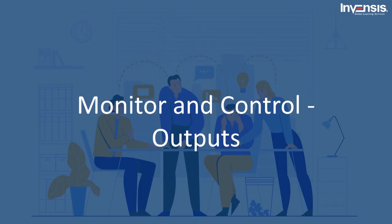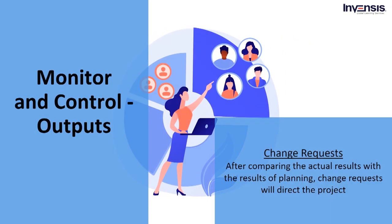In the next part of this session, we will talk about the outputs of the monitor and control process. The first output is change requests. After comparing the actual results with the planned results, the change request guides the project. You can instruct your project and product scope, quality requirements, schedules, and cost base to grow, adjust, or shrink. These changes pave the way for recording and documenting new requirements and can also affect project management plans, documents, or product performance. All changes that meet the project's change control criteria should go through the integrated change control process established for the project.